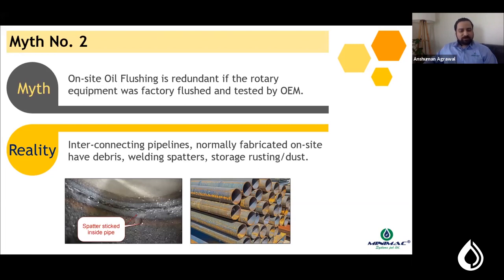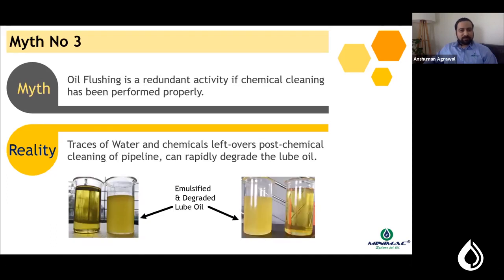Apart from rusting, we also notice a lot of welding spatters deposited on the internal surfaces of these pipelines when they are fabricated on site. It is very important to remove these contaminants before you start your equipment.